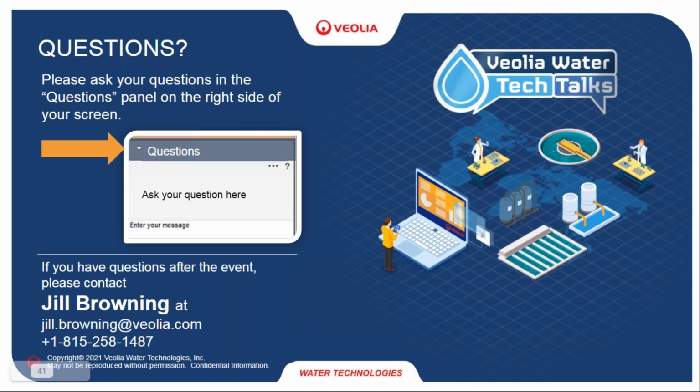So whenever we send anything out to you anyway, we always send an engineer. They go there, they start it up, they commission it, they install it, and they're there as well to educate the customers on, when that engineer leaves site, what readings should be taken, if there's any simple consumables that should be changed, or just things added or monitored on a day-to-day basis. And that technician also then returns to site on a periodic basis, whether it's daily, weekly, monthly, just to come and see again if everything's operating right, if it's performing right, and we're maintaining a commitment of quality and quantity of treated water.